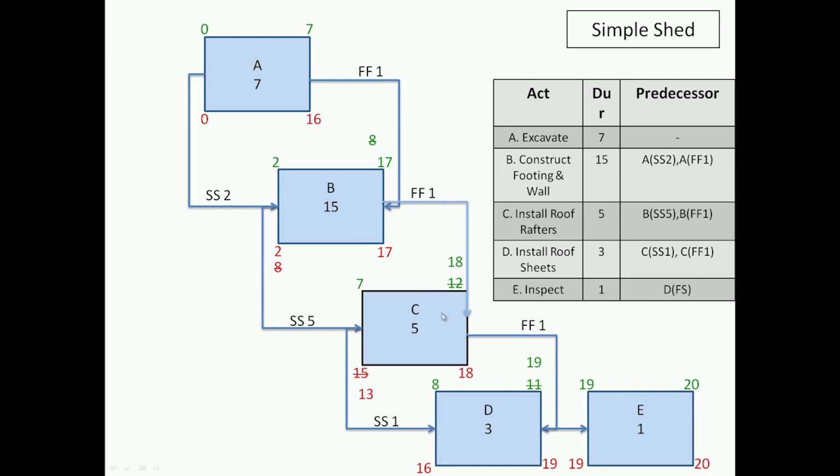But if we are going to do it with the precedence diagramming method, this is how it works out, where you have your A, B, C, D, E, and all of the relationships which we discussed are defined here. So we have the start and the finish with all the lags as we have specified, and we can now do the basic analysis which is shown here. From the start relationship we get 2, go to 15 we get 17, and from the finish what we got was 8.